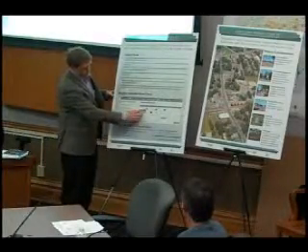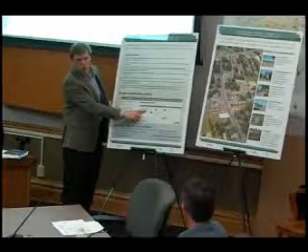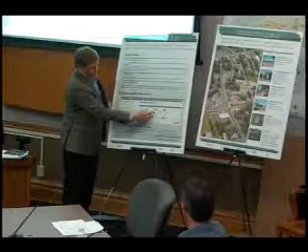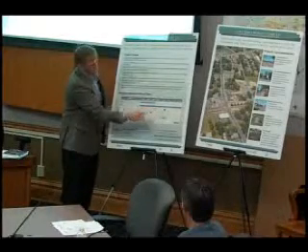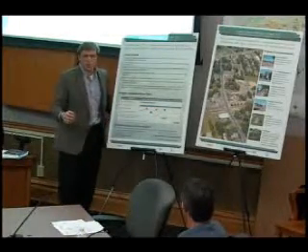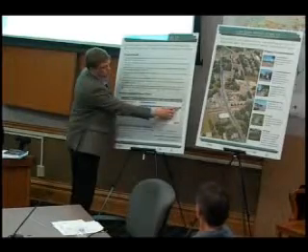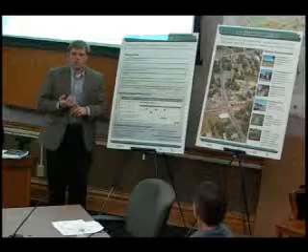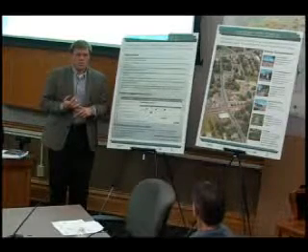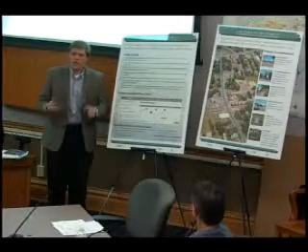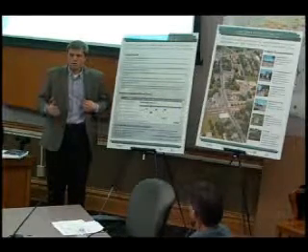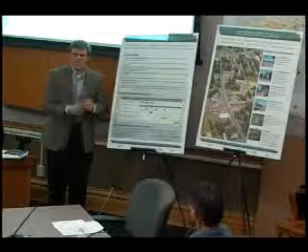We're right here in March. This first star is our first open house. Two more open houses are planned over the course of this summer, likely in May and likely in July or August. But I think the key point here is that by September, Washington County wants municipal and county approval to go into preliminary design. So in terms of if we think we have a ton of time to move forward on what these improvements are gonna be, I would say the reverse is true.